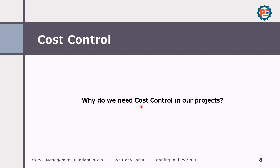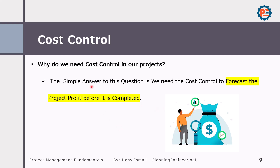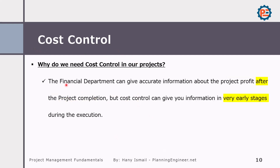Why do we need to make cost control in our projects? The simple answer is we need cost control to forecast the project profit before it is completed. Before the cost control concept, the financial department could only give accurate information about project profit after the project was completed. Since this is not aligned with the proactive concept of project management, cost control gives us this information at very early stages during execution.